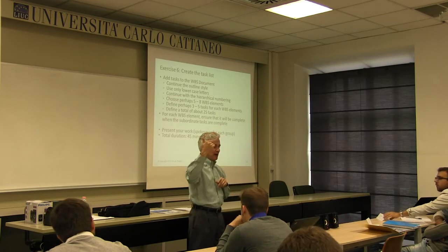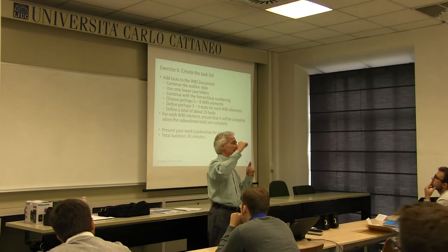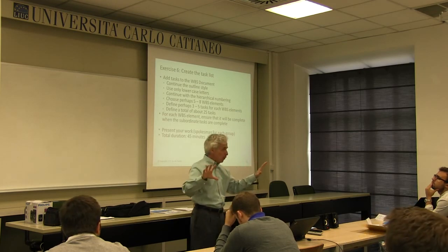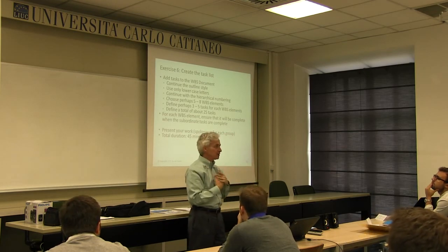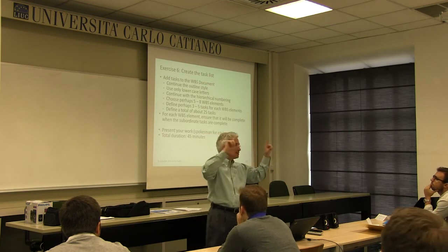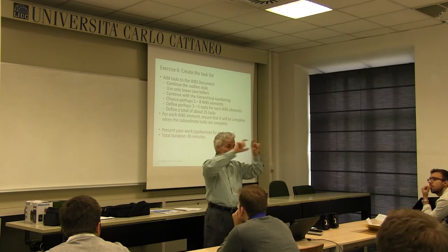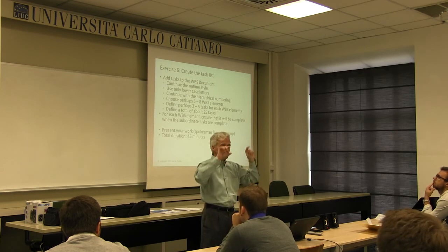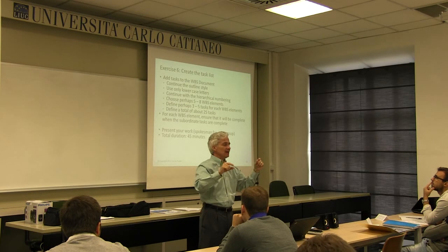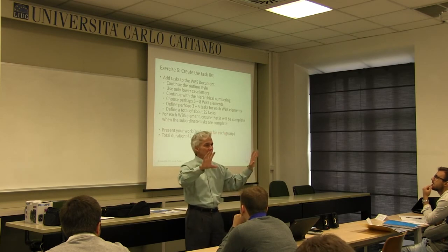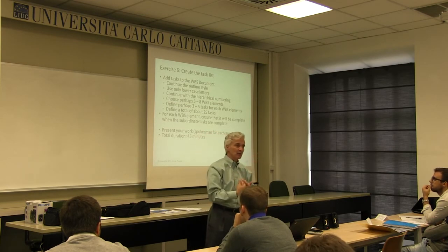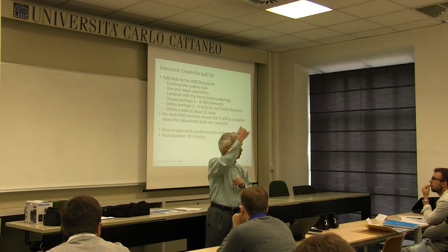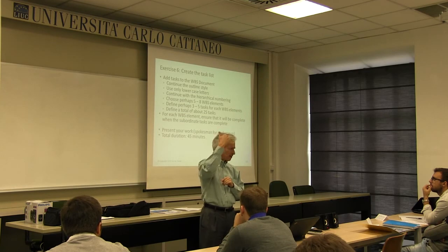So, continue with outline style. Remember, now we're talking about tasks. My advice, it's not a rule, it's not a standard, it's my suggestion: for WBS elements, use only uppercase. For tasks, use only lowercase. Again, this is not a standard, this is not a rule, it's just something that I have learned that's very effective. So, continue with the hierarchy.